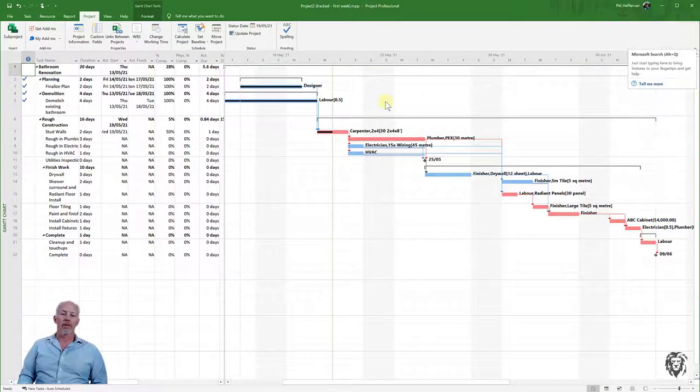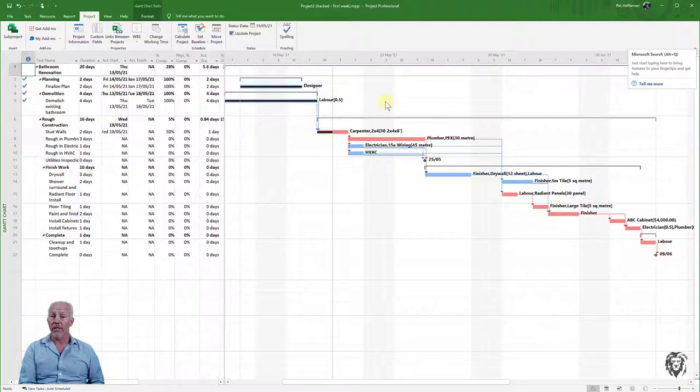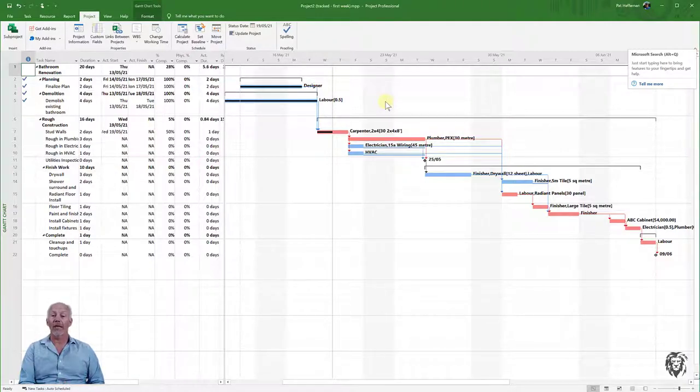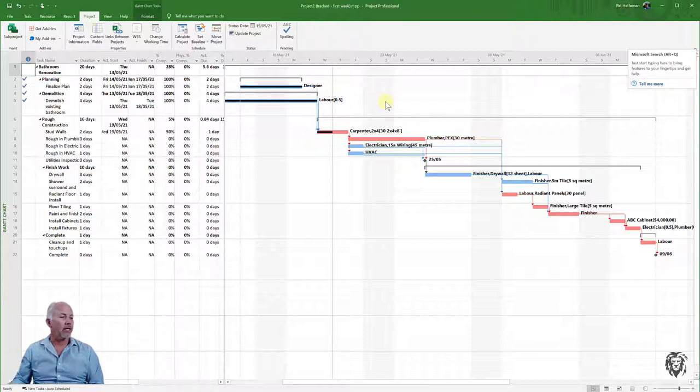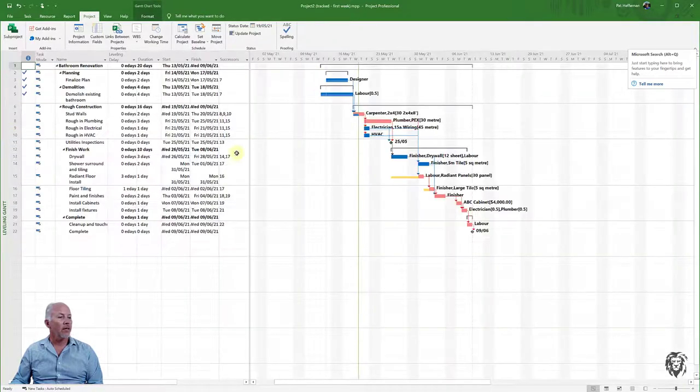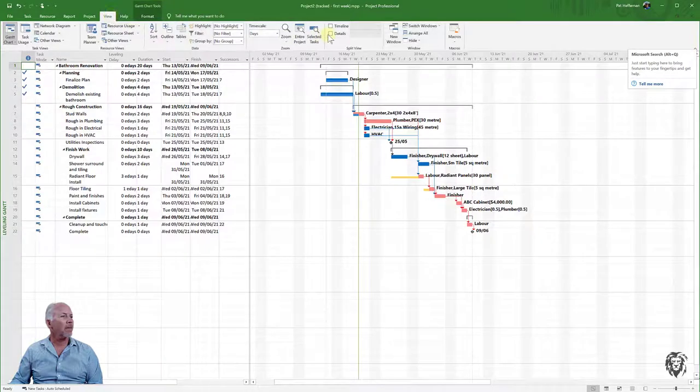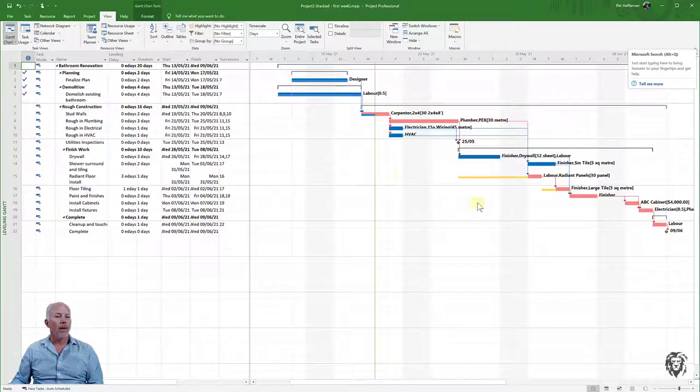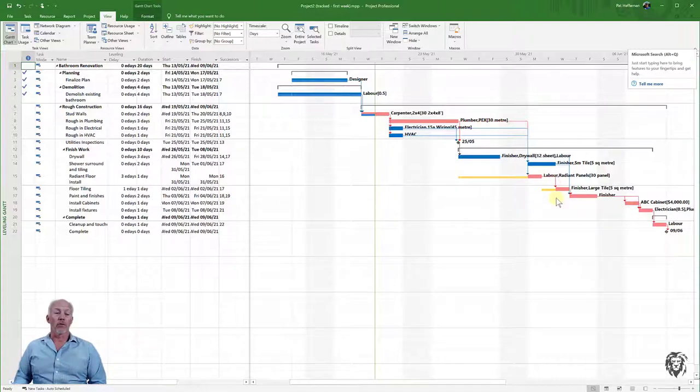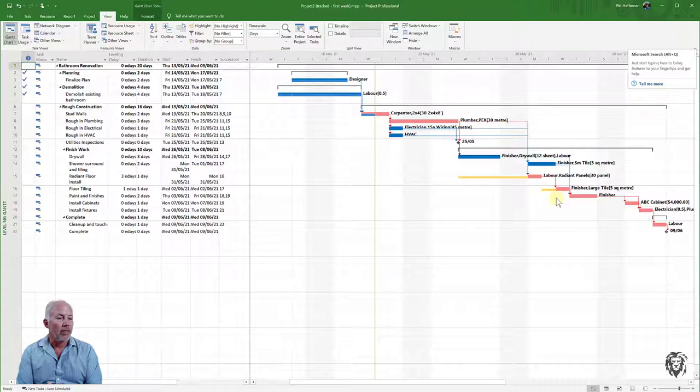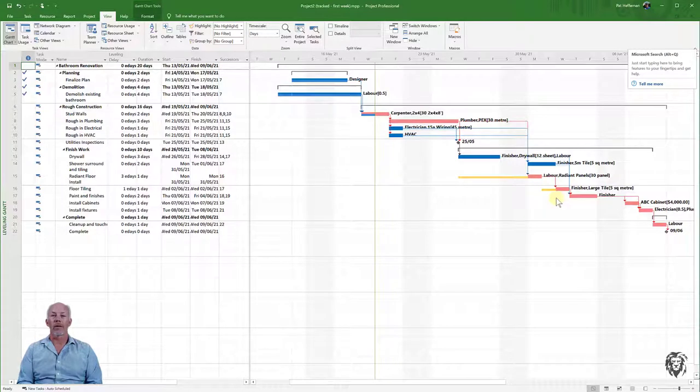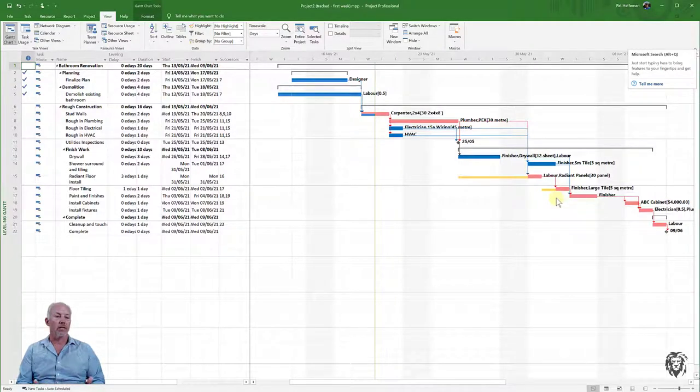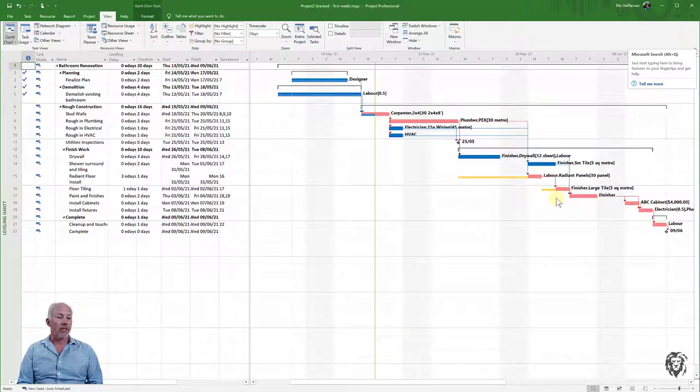The first thing to consider is that this project has been fully resource leveled, which required incurring delays along the path. We could achieve savings by reducing those leveling delays. In the Leveling Gantt view, you can see those delays. To remove them, we could acquire additional resources or change the manner in which we're implementing a particular task.